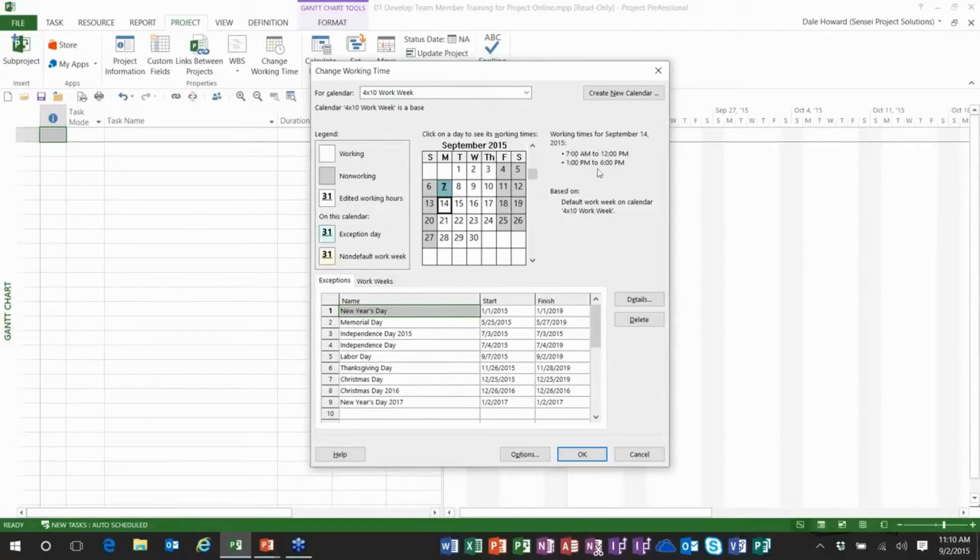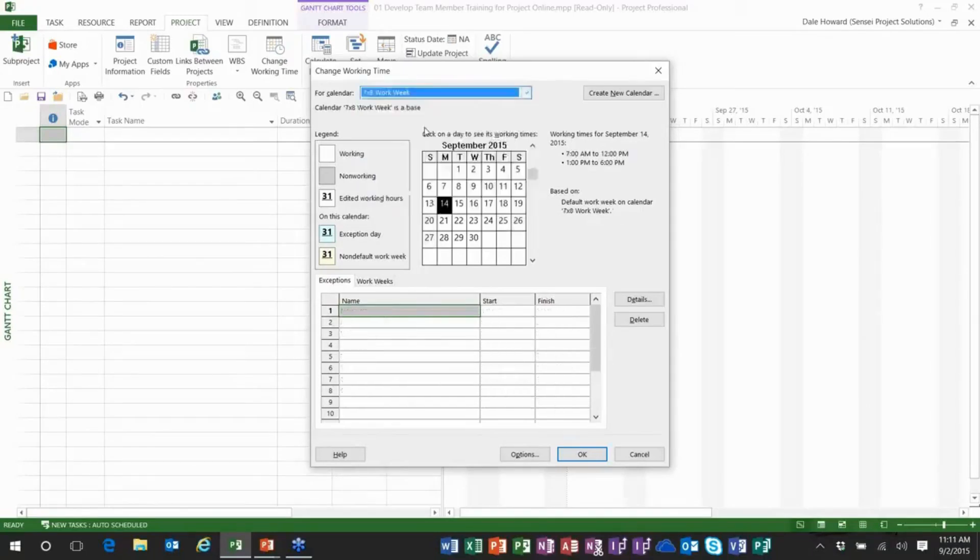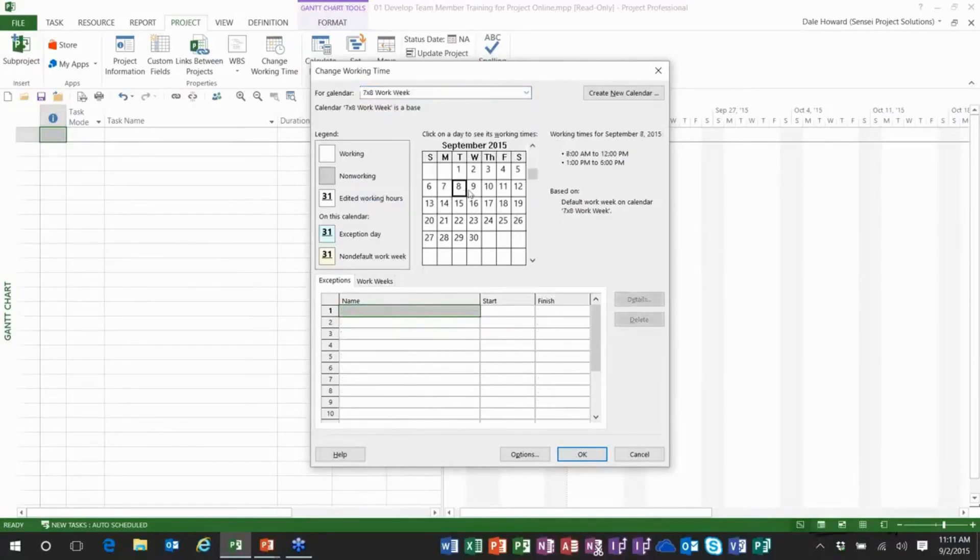7 a.m. to noon and 1 to 6 p.m. each working day. Beyond this I've created a seven by eight work week calendar. This is to use whenever we need to fast track and schedule a task to be worked on seven days a week.